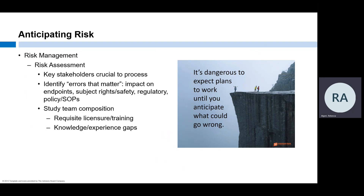Risks could be big or small. For this initial assessment, look out for the errors that matter—deviations or unanticipated problems that would impact the study's endpoint data, the rights, safety, and well-being of subjects, or result in non-compliance with regulations or institutional policy. We also need to consider whether the study team has the licensure, experience, and knowledge to successfully execute the trial. Are there aspects that require specialty care, or team members new to the institution or clinical research who would benefit from additional support?